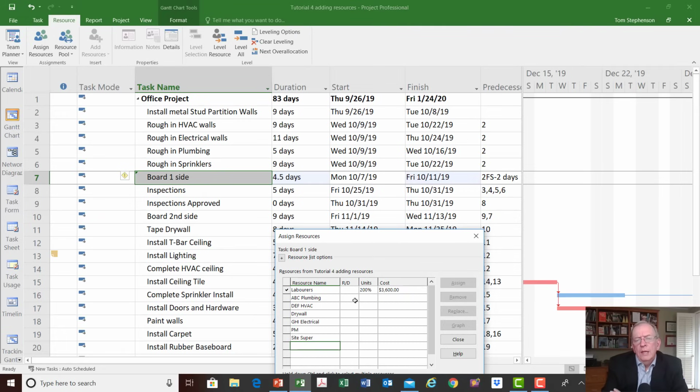So if I had that same ditch that's being dug, and we're going from 2 weeks to 1 week because now we got 2 laborers, if I add another 2 laborers, that would be 4 laborers, then it should be 2.5 days. So I got 4 laborers, 2.5 days. If I add another 4 laborers, I double it again, that should be 1.25 days. So I got 8 laborers, 1.25 days. If I add another 8 laborers, that should be 5 hours, or 5.5 hours, I guess.